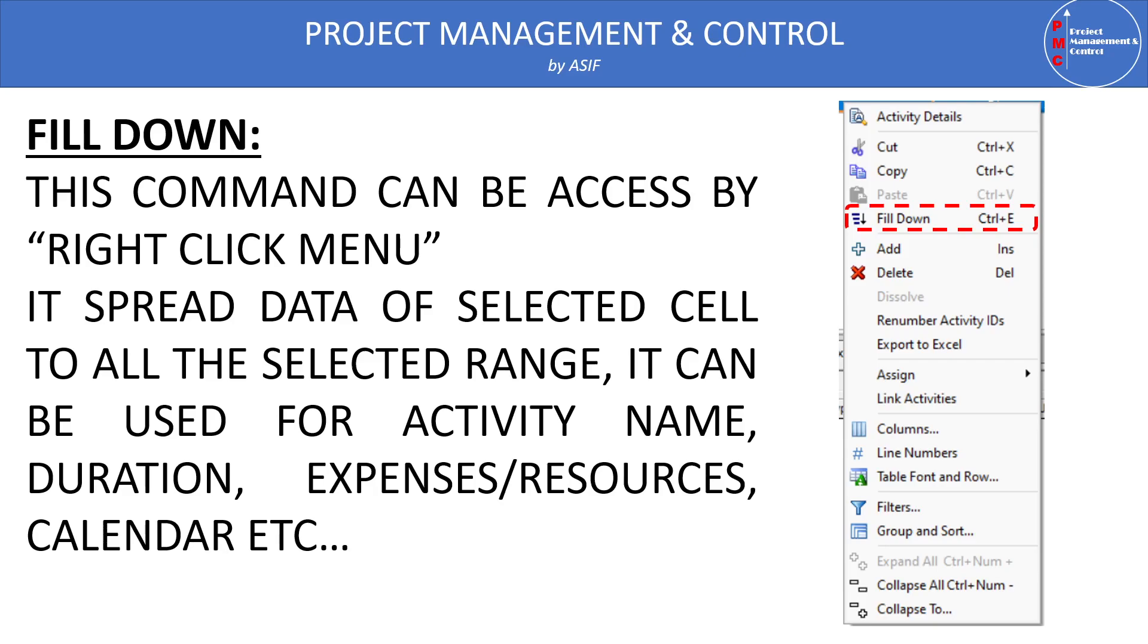So the data in the selected cell is spread either up or down in the full range of selected data. This distribution can be useful to spread the activity name, their duration, their calendar, their start date, or sometimes the resources or budget units can be used to spread very fast in several activities at one time. So in short we can say that all the user defined data can be applied in bulk using the fill down command.